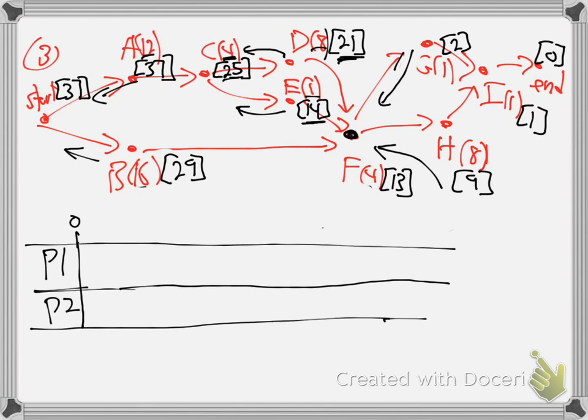Now, what if they said, I want you to do this problem using the decreasing time? Remember, there's different words. What if they said decreasing time? Well, that would just be the parenthesis number. Remember, that was just the parenthesis number. So I would start with, it's always high to low, the higher parenthesis number, which would be 16, because B is 16, higher than A, 12. In that case, I'd start with B, if I was doing it by decreasing time. But I'm doing it by critical path. Critical path means look at the bracket numbers, look at the whole path.